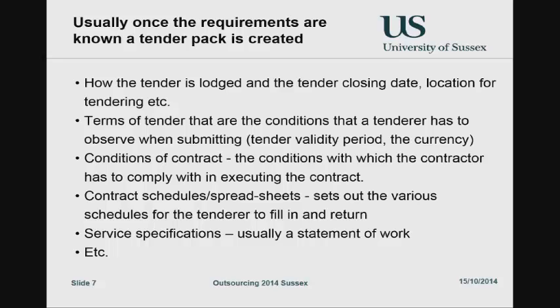So in terms of tender validity and all the rest of it: conditions of the contract, what you must comply with, all that pretty standard stuff. Contractual schedules and spreadsheets set out the various schedules for the tenderer to fill in. Now this is quite important actually, funnily enough. More important than you might think. You send out standard formats, perhaps even Excel spreadsheets, already set up, and you constrain all